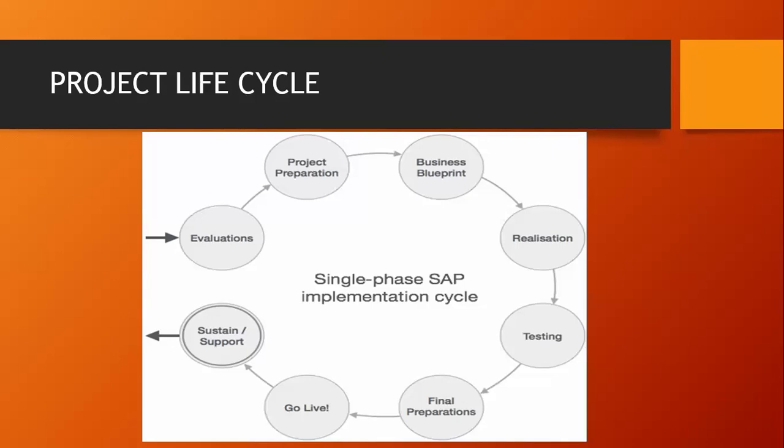They have to test run what has been done to make sure that every single area on SAP is working perfectly well, and the accounts, the chart of accounts, and every area fits the client's purpose. Then you have the final preparation where they test things like the servers, the various clients, these various end users, and they look at other things that they missed in the testing phase.